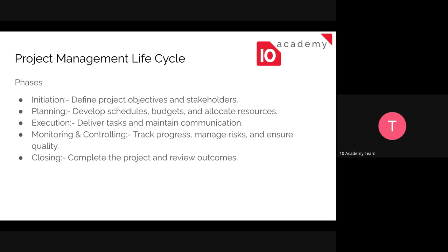The second one is the planning phase, which will include scope, time, and cost, the triple constraints. It will specify the scope. For example, using the previous scenario of building an office for 100 employees, we can consider that the building will have maybe three floors with an estimated area of land usage, and then we can also specify the design, which might include open offices, meeting rooms, and a cafeteria. These are the scope. For example, if we say the building won't have a cafeteria, that also specifies the scope of the project.